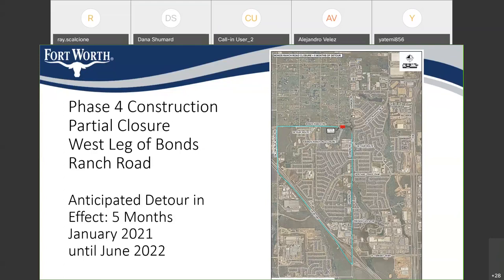How do you plan on controlling the dust with the construction? Do you have a mitigation plan in process? We will have a water truck servicing our project, and in times when it's too dry and we see that there's a lot of dust, we'll be watering down the soil at the site. And as far as the roadway, we have sweepers in place, and we will try to maintain everything as clean as possible and keep the dust as low as possible. The city will also have an on-site inspector, so he'll be watching out for those kinds of things as well.